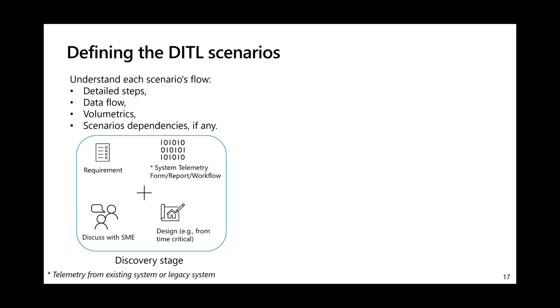It's because we need to ensure the process definition is ready finally. And I have checked the system telemetry to find out how the system runs in the week or month. Then I have the evidence to identify which core process must be included in a scenario. Check the telemetry from the system usage.